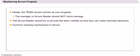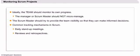Common tracking mechanisms that are inbuilt into the methodology are daily stand-up meetings, where the entire team reports its progress to each other, and reviews and retrospectives. The fact that the team has to demo working software at the end of each iteration provides a lot of visibility into progress. If the team was not making sufficient progress or if there were quality issues, this would become pretty obvious in the sprint review. The retrospective provides the team the opportunity to take all the feedback on board and take corrective actions.